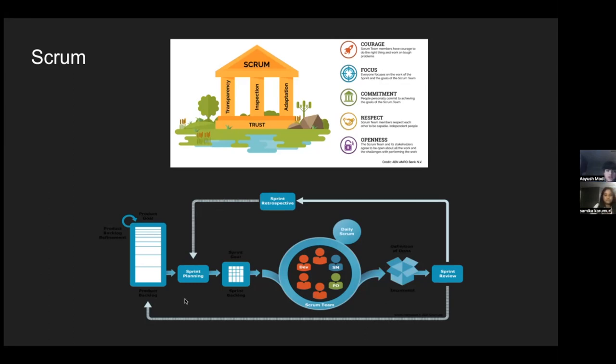At the beginning of each sprint, the team plans the work to be completed during the sprint. User stories from the product backlog are assigned to members of the team, and stories are also placed within the sprint backlog, which is a list that carries stories that may be completed later in the sprint. This is also where the definition of done is determined. The definition of done is a set of criteria that must be met for a product backlog item to be considered complete. The team will also set the sprint goal, or what they want to achieve during the sprint.